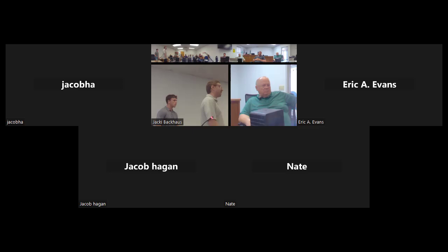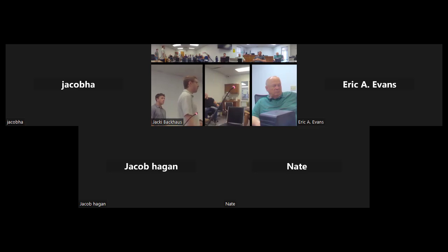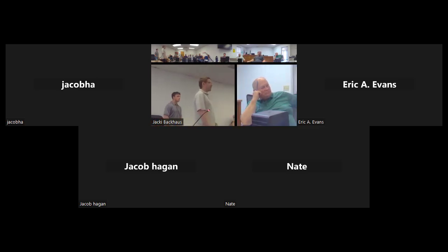I think that would give them enough time to do it this fall, before it frosts. We don't like doing winter work necessarily. We think we get better bids when there's not frost in the ground, even accounting for crop damages. We think it comes out cheaper without having frost, since contractors don't like working with it.